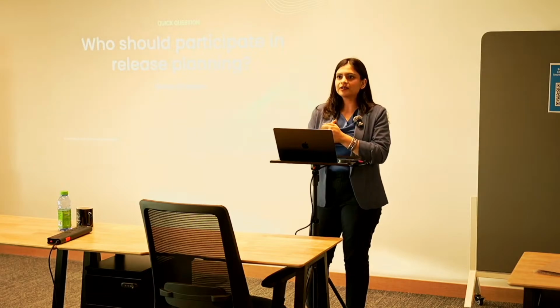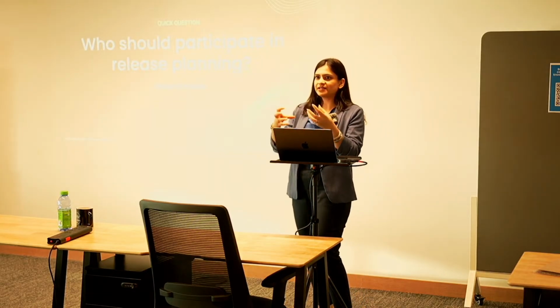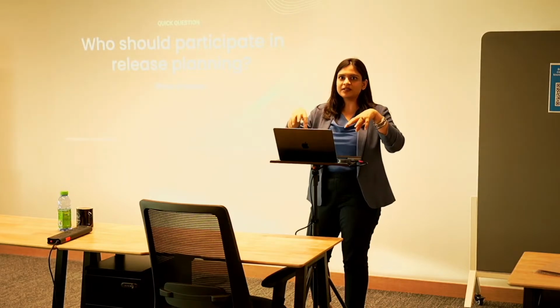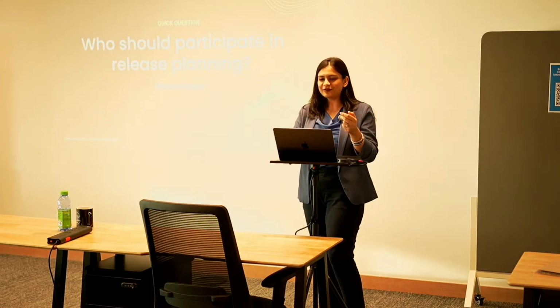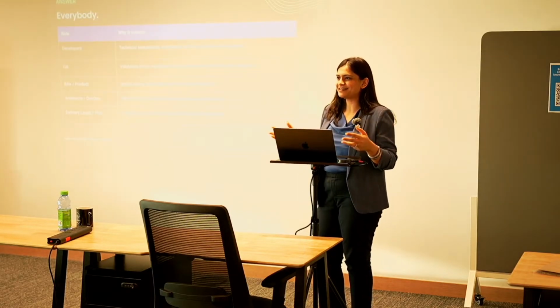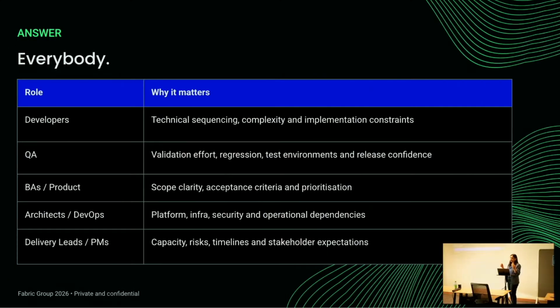I think Shoaib, you mentioned identification or representation from different domains like quality engineers, infra people. So I think all of these are great inputs, and effectively that's what my answer is as well. I think all roles are important to participate in the building of a release plan, right? So developers play a very unique role in helping with technical sequencing, right? I think you mentioned early on that having an idea about how things can be sequenced technically so that we can have independent and incremental release cycles. That's the perspective that a developer can share.